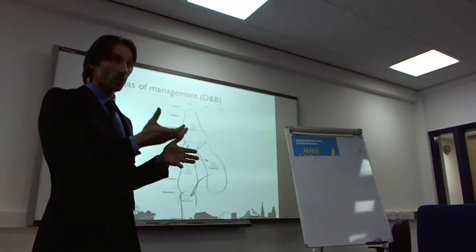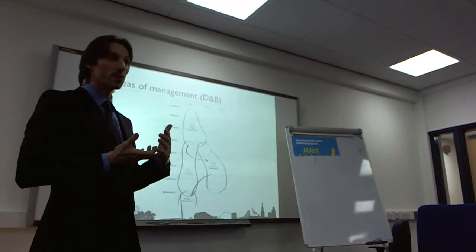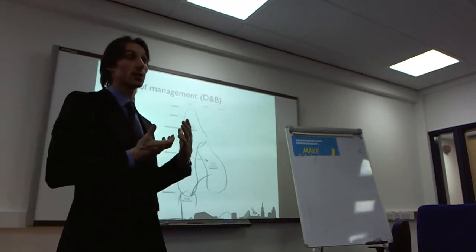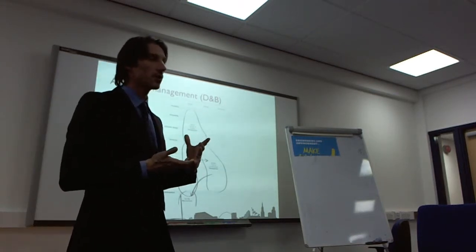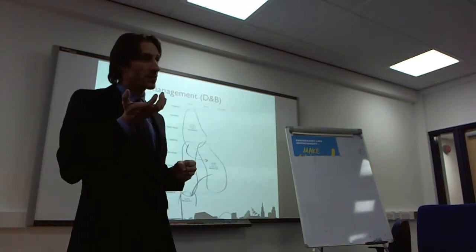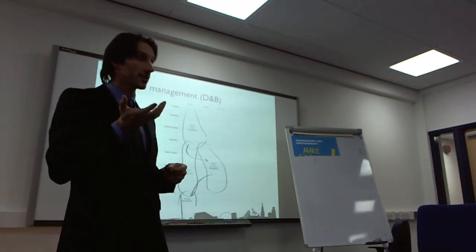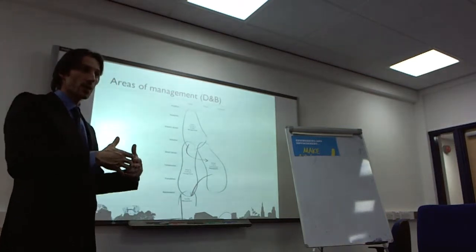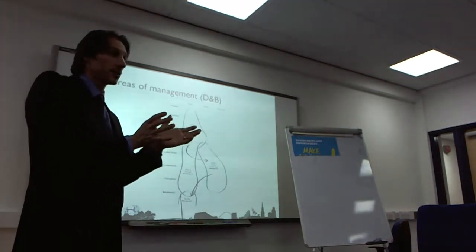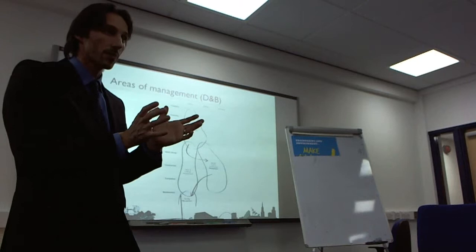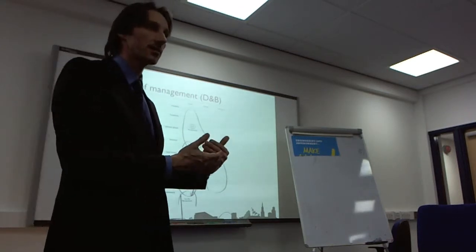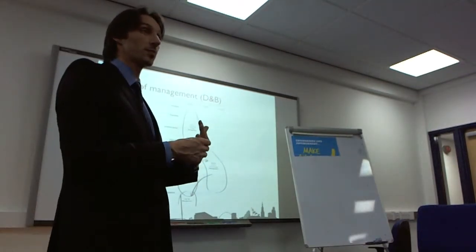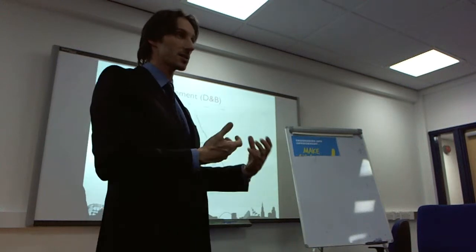So the contractor takes up more risk than they would traditionally take, because they know that they have some freedom in detailing the final design. So they take some ownership of the project. They know what their boundaries are in terms of brief, but then they can take up more risk because they are more empowered in the design stage.